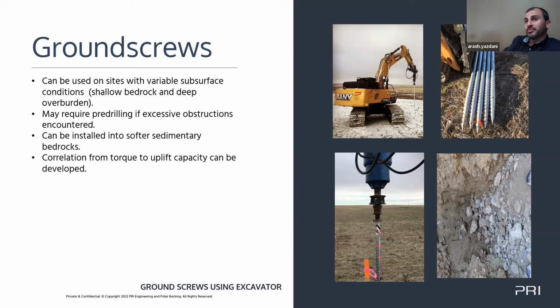So I do appreciate the plug or the setup, because we did design our rack at the beginning. Most of the sites we were doing were helical, so we did account for a lot of adjustment in our rack to accommodate. And Dan has been a good beneficiary of some of that adjustability. Yeah, I've seen it on site. So when there is a pile that's off, you don't necessarily have to pull it out of the ground and fix it, as long as you know that the racking system can compensate for that, all the way through.